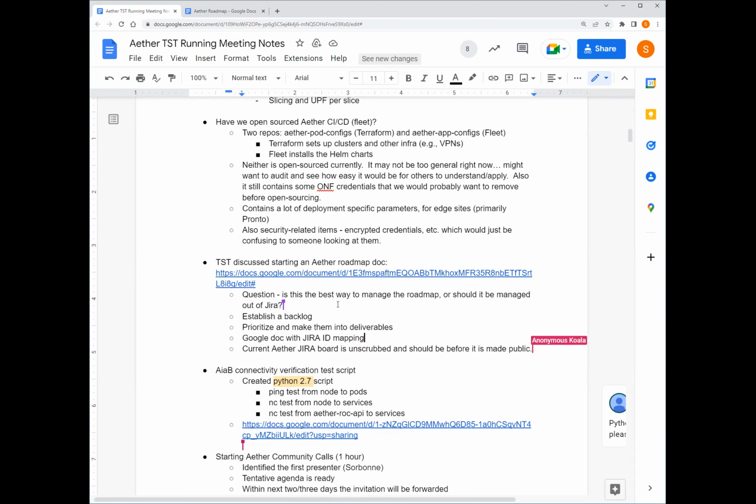Yeah, that sounds good. Sometimes the way we've occasionally done it in the past is, we'd put high level points in the document, and you turn those into epics. Yeah. And then maybe the tasks and stories only live in Jira and don't make the document. But I think there's multiple sane ways of approaching that. So, ONF, what you're describing makes a lot of sense, that you've got a high level capture of it, with the IDs to dive deeper, but a lot of the details are down in Jira.